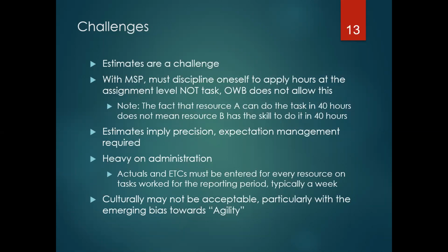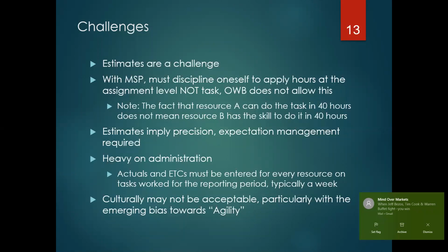You just don't know. One of my favorite questions for a project manager is, hey, I've got a task that's got 2 resources. I've baselined it at 20 hours and $1,500. The task is now over. It's under in hours, but it's over in dollars. How can that be? The quick answer is there are 2 bill rates for the 2 resources. I have a senior resource on the task at $100 an hour, and a junior resource at $50 an hour.